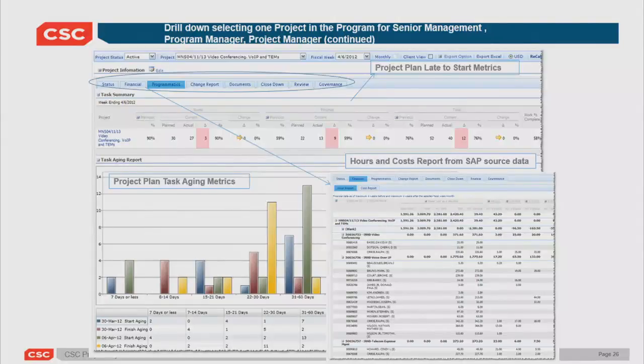So you're actually getting down to some deliverable or task level? Well, there's not task level detail in SAP, but I bring in the WBS, if you will, that person's charged to. And so I bring his hours in every week. They have to allocate it themselves based on what they've accomplished in their tasks. And so that gives me the ability to match it up to say, is it right or not? So we don't interpolate the data from SAP into the project plan and just mash that across the tasks. He's got to be able to give me a remaining work on each task. How much remaining work do I have left? And that gives us a more accurate picture of our estimate at complete.